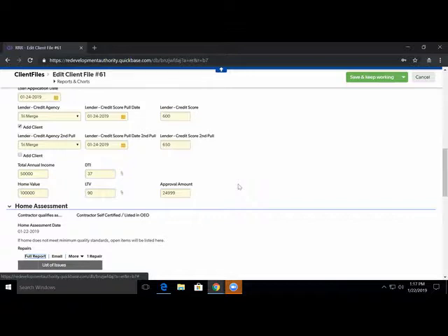And then after that, the homeowner gets kind of a work scope and figures out, kind of has a contract with the contractor, and then they go into the lender once they've come up with a work scope that includes a contingency, and no less than 60 days after their pre-qual, they go in and they fill out the formal full loan application.